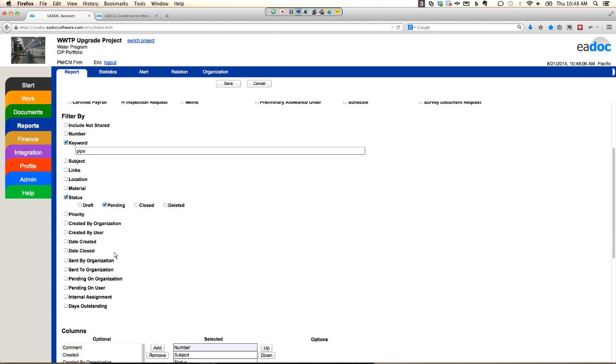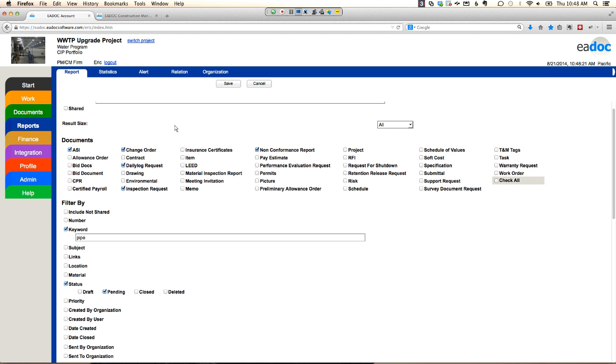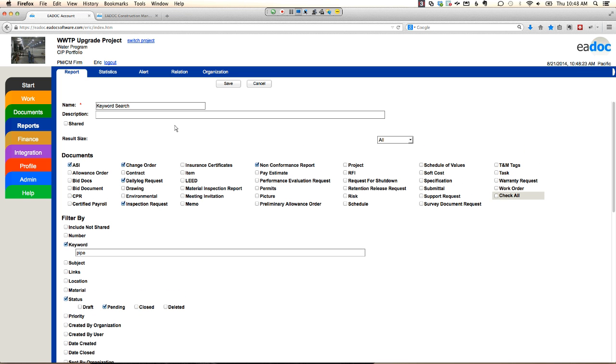Is there any ability to add regulatory people, such as building departments and building inspectors? Have you seen any success integrating the regulatory environment into a project? Absolutely. One of the more successful projects we did was a healthcare project in California with the state regulatory agency, OSHPD. They were logging into the system, being notified of their inspections, and actually doing their inspections in the system.